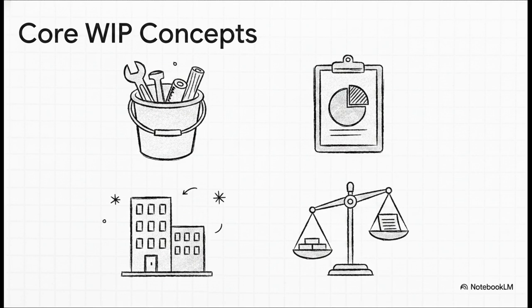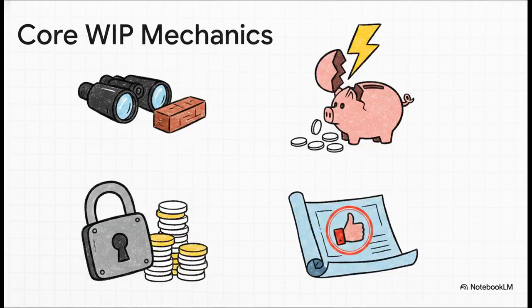Like we said, you already know the jobs. This just gives you the precise accounting translation. Just quickly, wrapping up the core mechanics for you, the PM's estimate to complete is the trigger for all forward-looking math. Foreseeable losses, we know this now, they are booked immediately and in full, never spread them out. Retentions are money you've already earned, they're just held back as a separate asset. And variations must be treated extremely conservatively. Unless approval is highly probable, leave them out of your revenue.